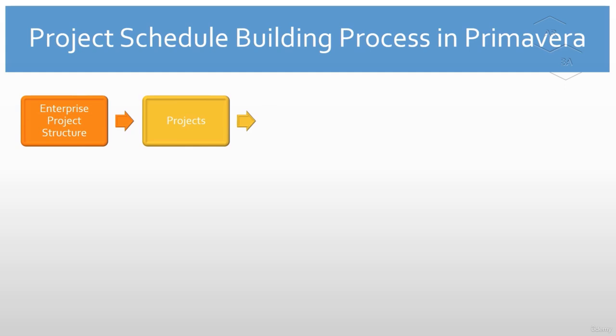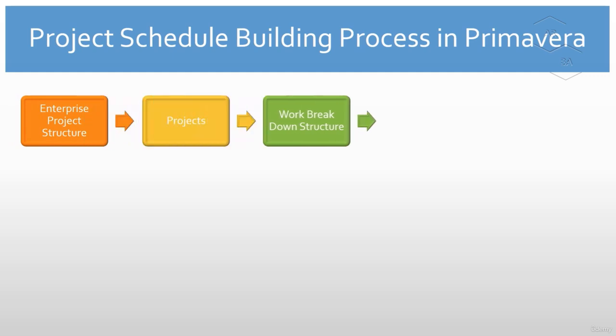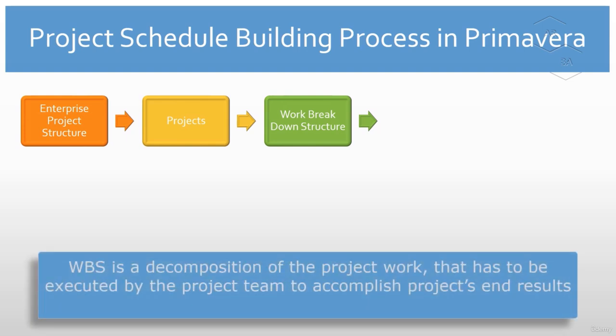Then in step 2, by keeping our project objectives and end product in mind, we will break down and divide our whole project work into parts or sections — more precisely, a WBS. WBS is a decomposition of your project work that has to be executed by the project team to accomplish project goals and results. All the work in the WBS has to be identified, estimated, scheduled and budgeted.